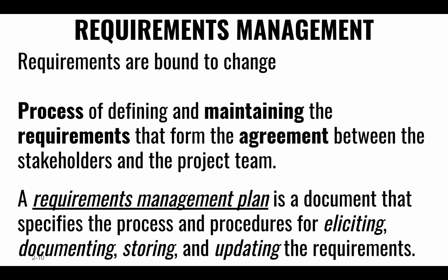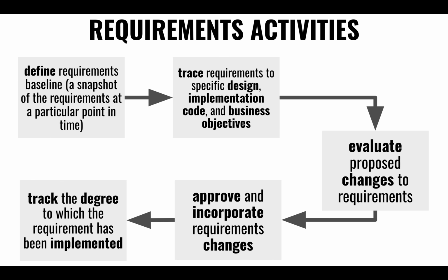Right? And they will be converted into stories or use cases, and put in some backlog that the software development team will then grab. They will be prioritized, and then we'll schedule them to some particular sprint or some particular quarter, or a particular phase of the project. But there has to be some formal requirements management process, right? It's just not chaotic, right? We can all agree.